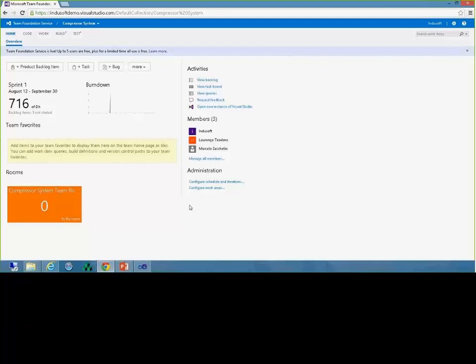They spend several months writing their big SCADA, and then they go and deploy it at the customer. And the only chance the customer really has to give feedback is at the end of the project, or at a point where you have already spent too much time doing something that's not what the customer expected.